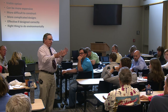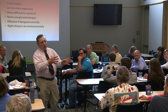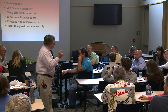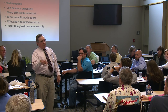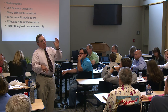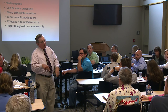The Corps marches to a different drummer. Sometimes they can be a couple weeks, sometimes it's a month, sometimes you have to call them. And as far as the Wetlands Board is concerned, right now they have to have a public hearing. And that's one of the things that the general permit that the state is working on is trying to get rid of, that requirement for a public hearing, because these are so simple.